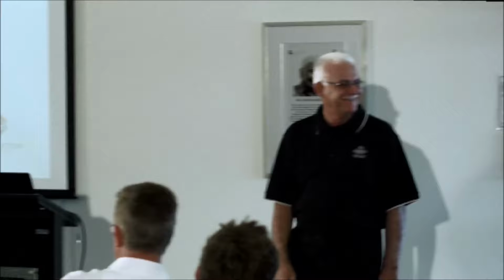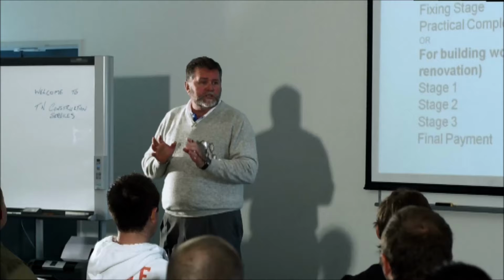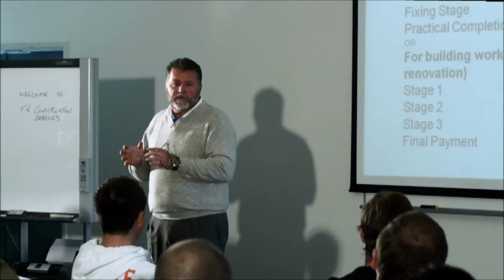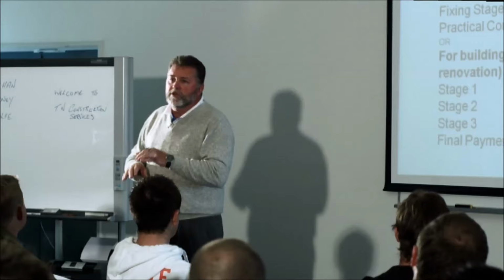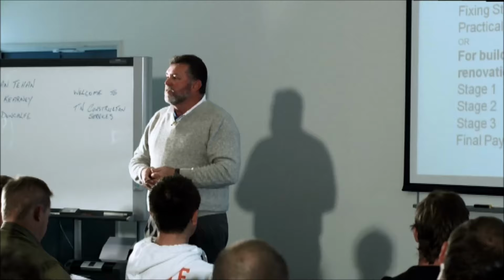Okay, in that regard, what I would do is this. If you have a look at the schedule of your works and you're going to have a massive excavation, and by massive I mean anything greater than 3 metres. Why would I pick the figure of 3 metres? Your soil conditions at 3 metres will change. In most cases, soil conditions relate to the top 2 metres of soil. So once you go over 3 metres, I would suggest you cut the block as a contract: do your retaining walls, get the site prepared, then do your soil test, then do the house.